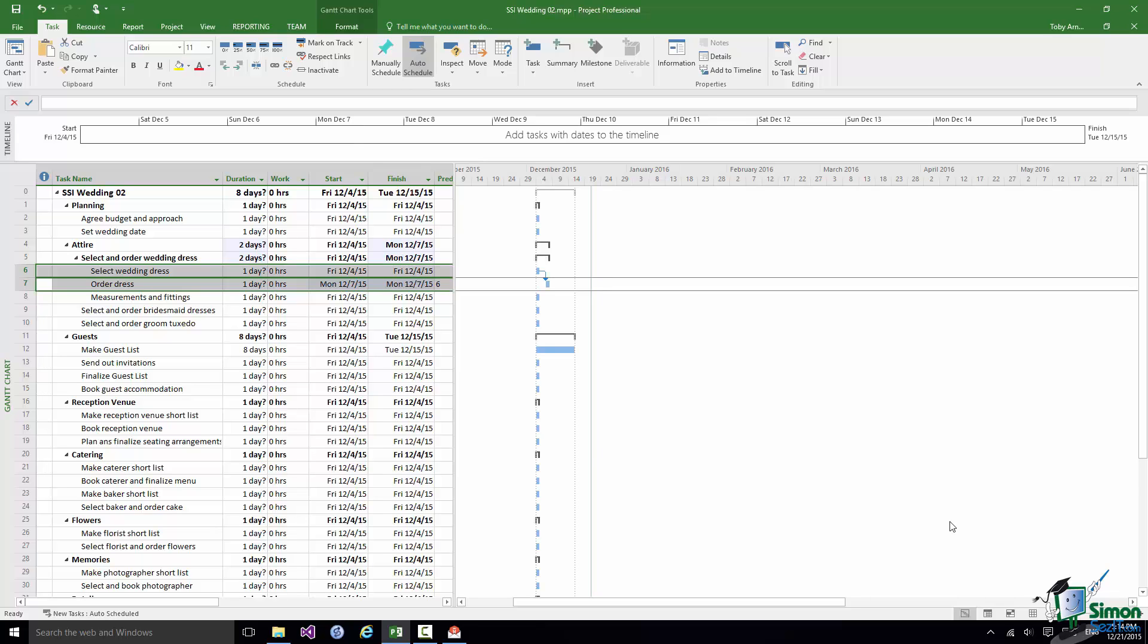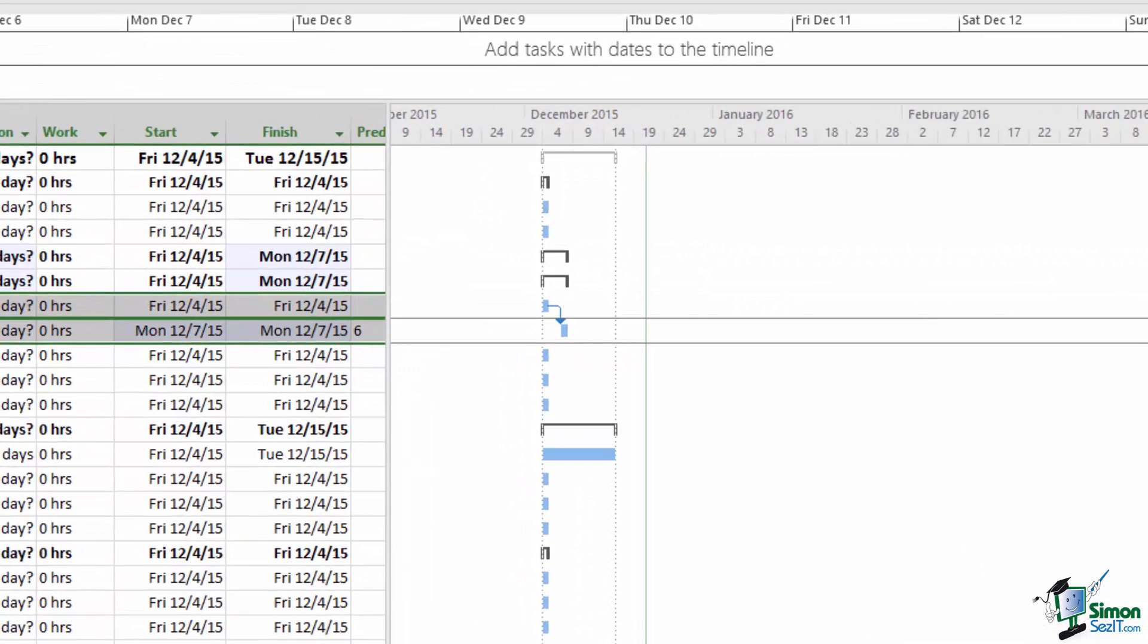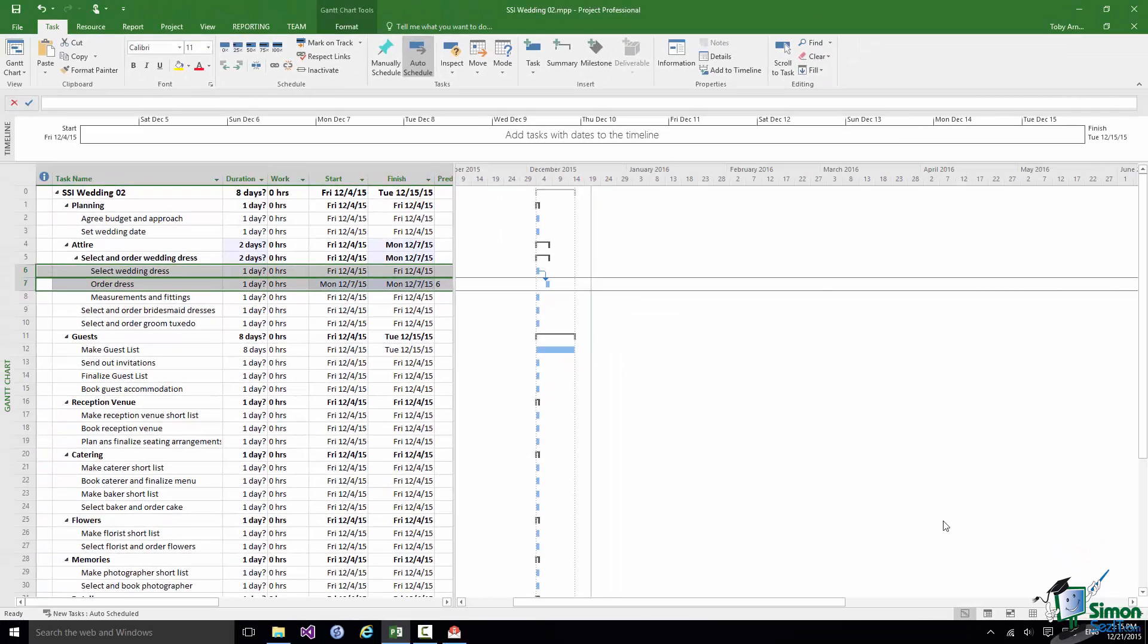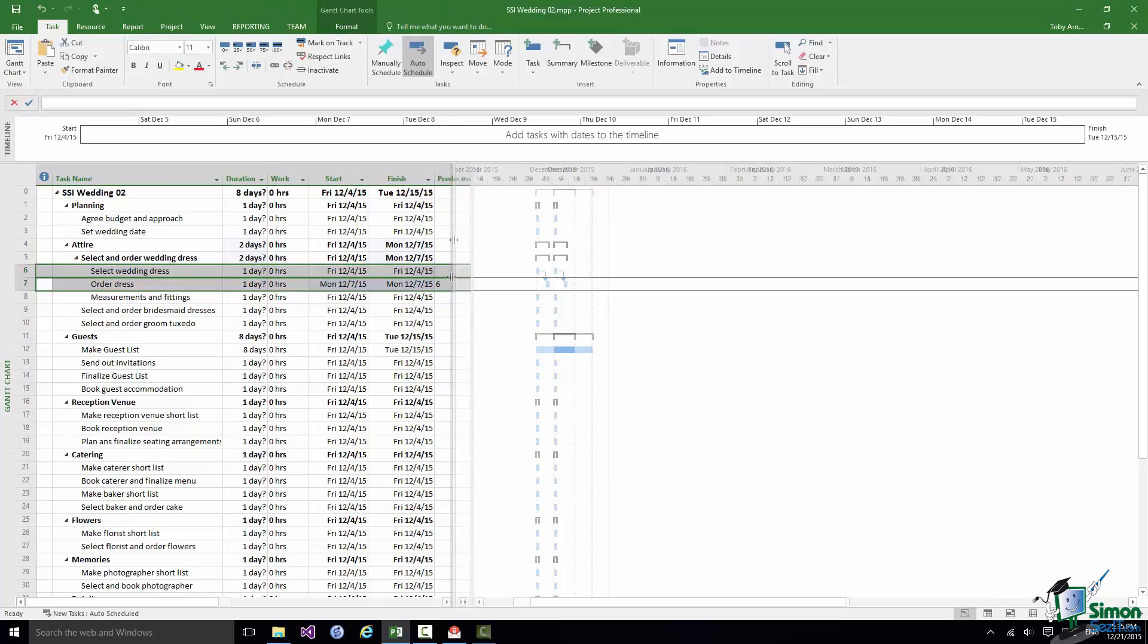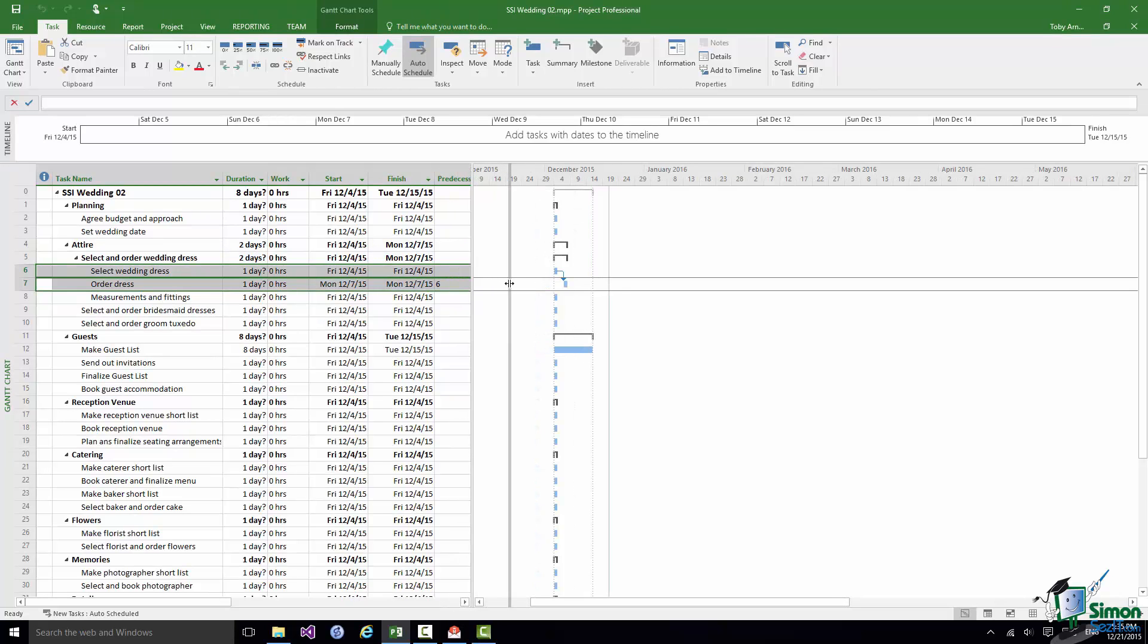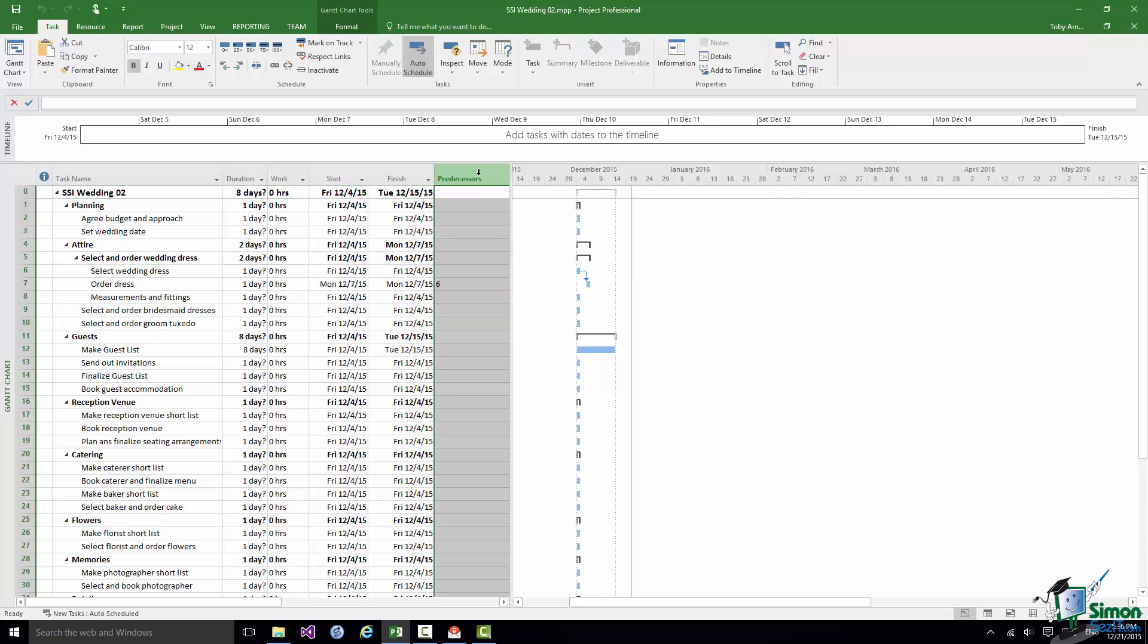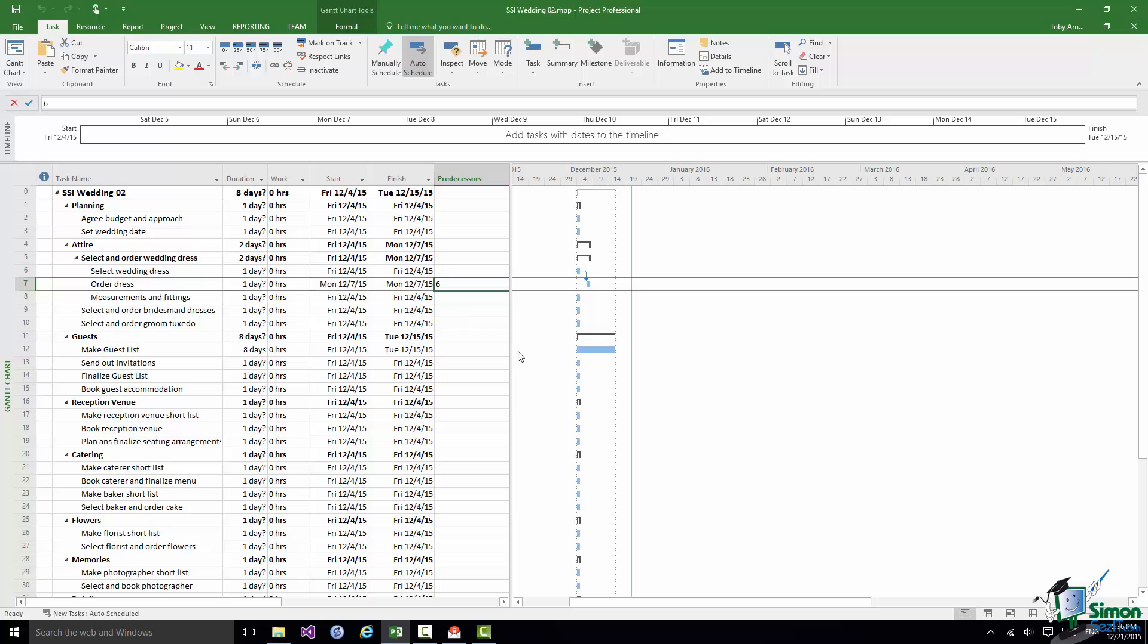If you look at the Gantt chart on the right you can see an arrow indicating the dependency whereby Task 6 must finish. You can see the arrow there starting coming out of the finish of Task 6 and you can see it going into the start of Task 7, Order Dress. And if I pull the divider over here you'll be able to see the contents of this predecessors column. And for Task 7 it now has a predecessor of Task 6.